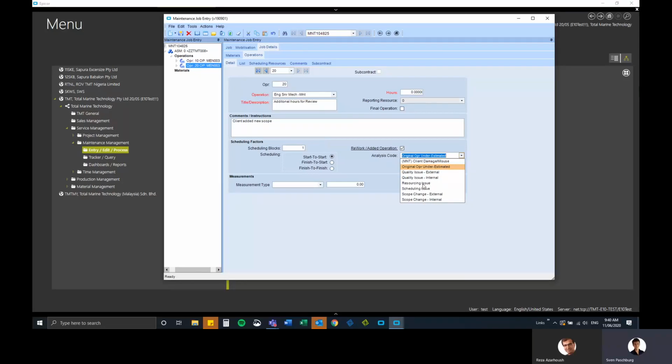It could be a resourcing issue. For example, your engineer was taken off onto another job and then they came back. And as you know, startup times are critical. They may start on the project, it's only 5 hours long, and then they were taken off. And when they come back, they need an hour to get their headspace back into it, right? Things like that. So that's a resourcing or scheduling issue. Again, your whole job might not have been prioritized, and another job has taken priority. And then you've come back onto this job, and now the job has to be restarted and re-looked at again, because it's been 2 months already. So these are some. I need to add the estimate.